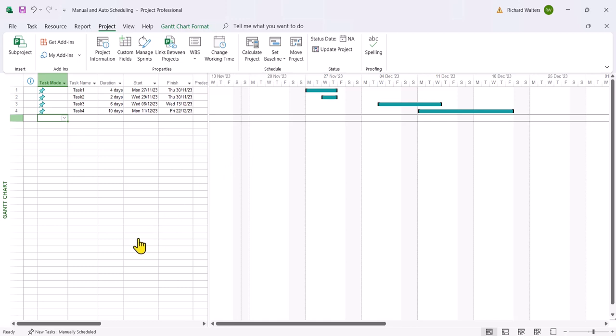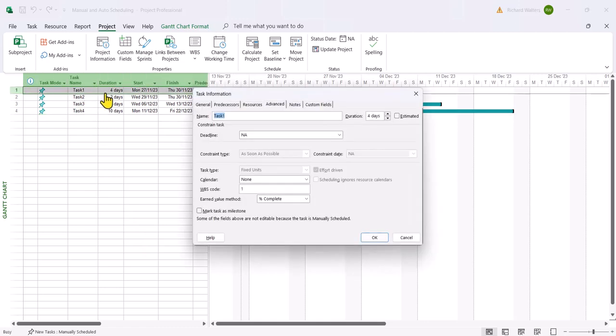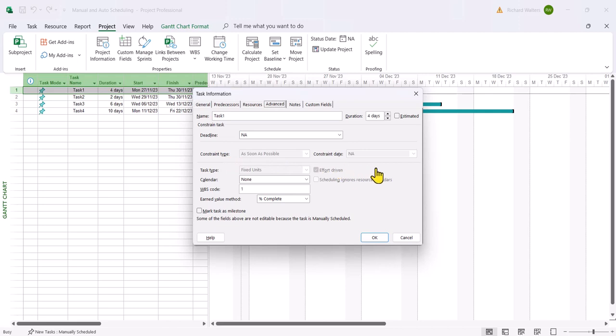Something else it doesn't link to, there's a strong feature on project called setting constraints. Now if I were to double click task one or any of the tasks, I'll just do task one which is ID one, and go to the advanced section, the constraint type is grayed out so they will not allow you to use constraints with manual scheduling which is a way of delaying a task if there's a problem with a task and rescheduling it. So it's a lovely feature to have but this is only available in auto scheduling.